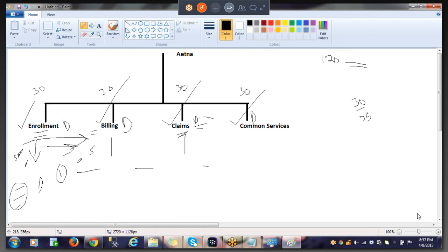Now, if you're doing incremental and you change your requirements, it's going to cost you more, and it's even going to waste more time because you have only one set of things and you have to start everything all over again. Your time is also going to be increased for the final delivery, right? Whereas with rapid, it goes with less time. Deliverables are quick. Yes, it takes cost, but less time. That is very handy for him, right?